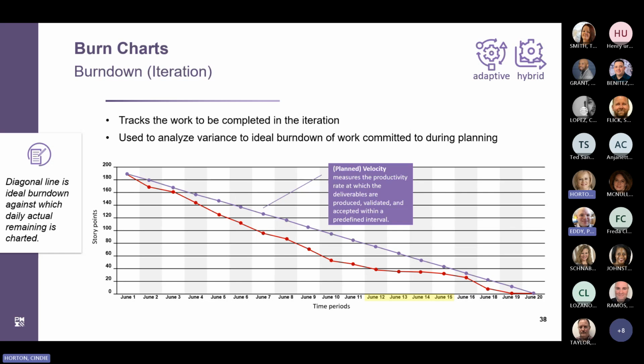The team creates a trigger point for when credit can be taken for completion of story points and therefore displayed as burn down. The burn down chart also helps to determine whether the current team velocity is on track and the expected completion status.